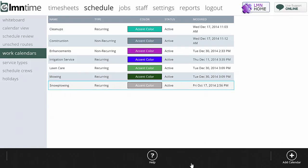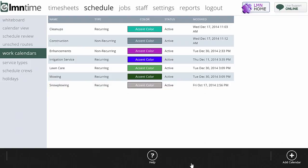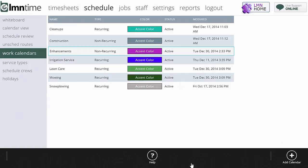You'll notice I've got a few samples set up: irrigation, lawn care, mowing. Work calendars are almost based on a division, so you can create as many of these as you want. Each different type of work has its own calendar, and each calendar has its own color so you can see it visually on the schedule. Most importantly is the work calendar type. There are two types: recurring, used for service work you do over and over again like mowing or snow plowing, and non-recurring, for work where you go and finish a project over a few days or weeks.